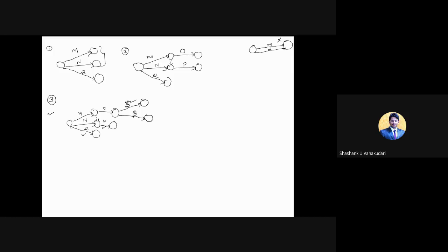For whatever the next activity is, P, Q and R are the predecessor activities. Just by finishing these three activities, that is activity P, activity Q and activity R, it can start. So I'm just shifting this activity from top to bottom, and similarly vice versa.